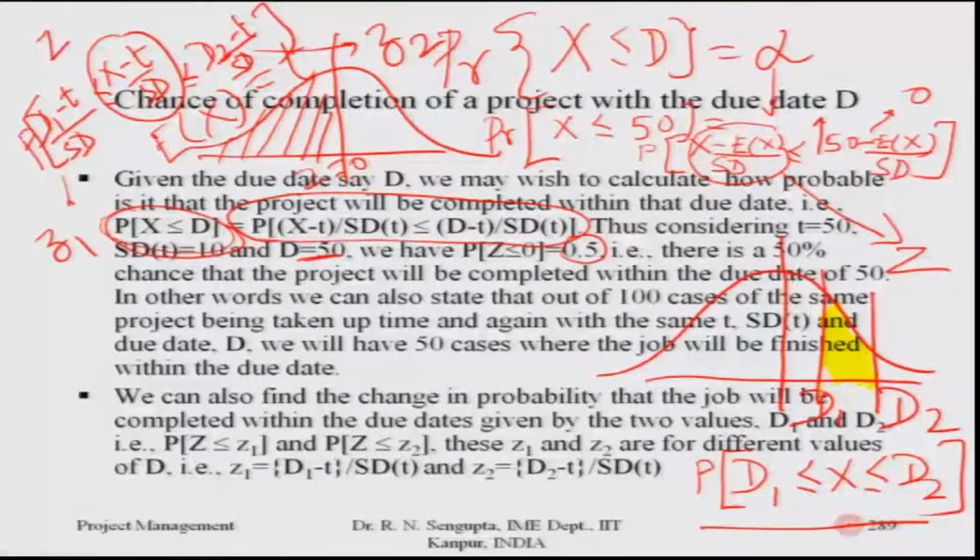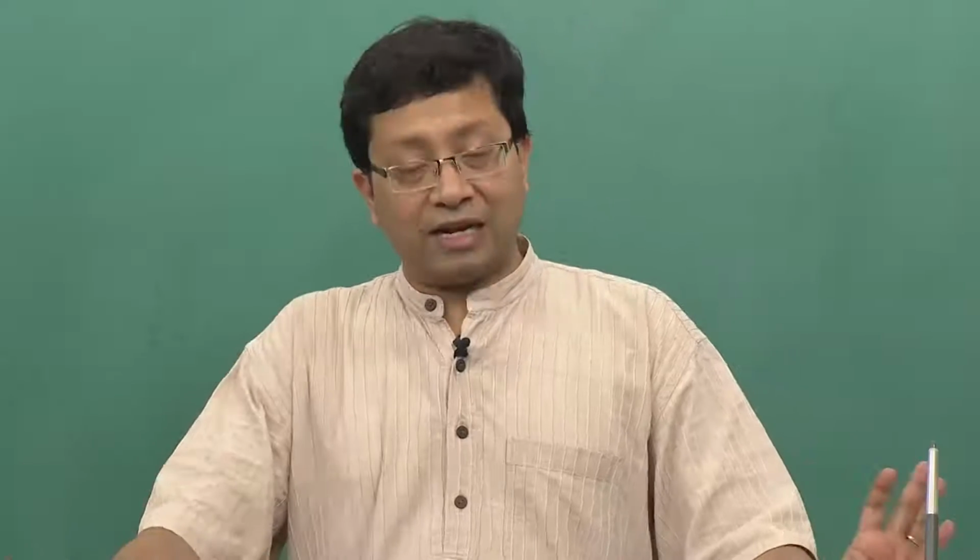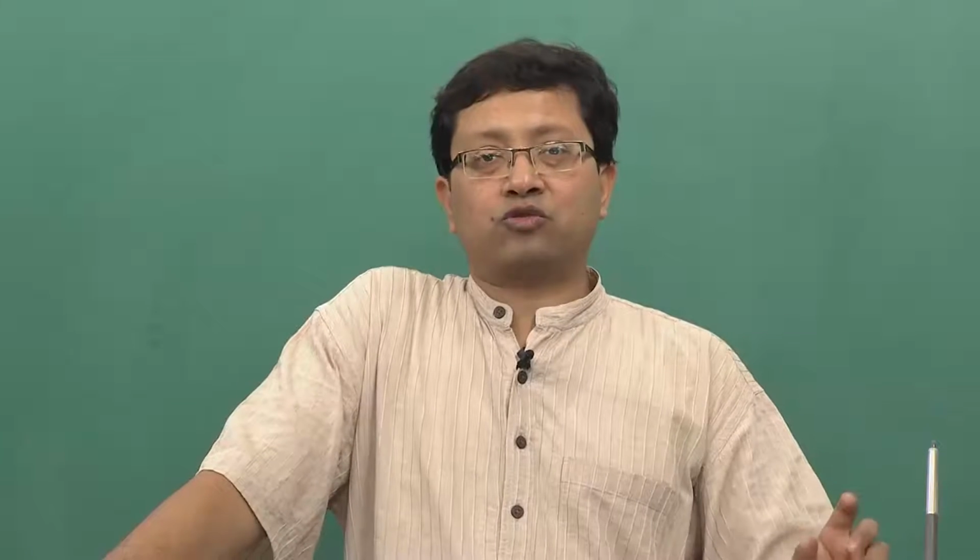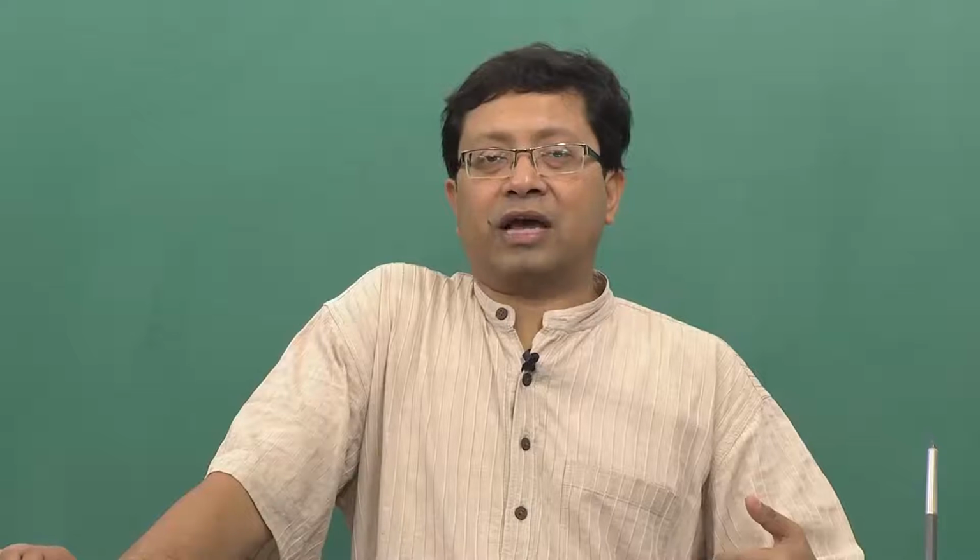Based on that I can find out the probability that I am able to deliver, because based on that I will recalculate my overall budget and take a decision whether I can delay or whether it is best to finish off that job before the d2 period using some extra man, material, giving overtime, trying to take help of other vendors, trying to pay them an extra amount of money, such that I am able to